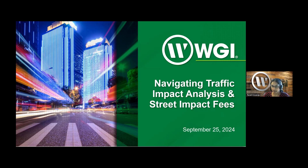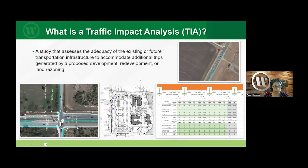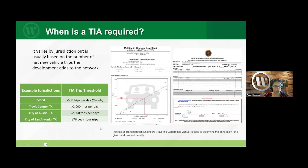A question that sometimes catches people off guard — whether it's developers, civil engineers, or whoever's doing due diligence on the site — is when a TIA is required. The requirements for when a TIA is required can change based on the jurisdiction. For example, TxDOT requires a TIA if the development is generating more than 500 trips a day, which is a pretty low threshold.